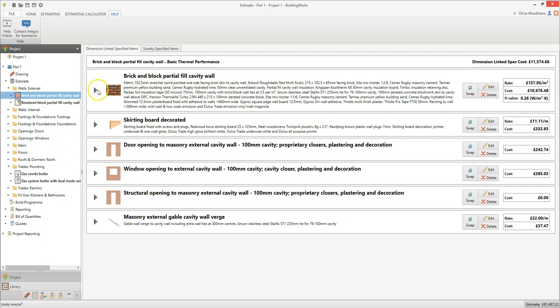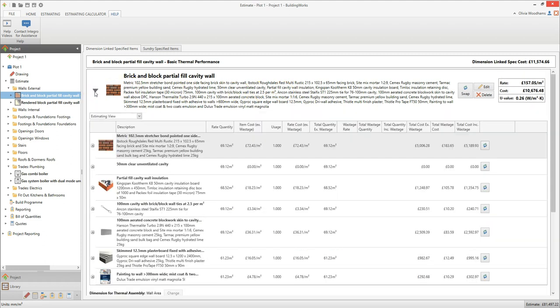Click on the arrow to expand an assembly and see all of the items which have been estimated. Now you can see each of the rates which make up this assembly. There's a rate — in other words a cost per square metre — for each distinct task such as laying the brickwork or fixing the insulation. Each rate includes the cost of labour, plant and materials. From here you can see the rate quantity and also the cost per unit for each rate.